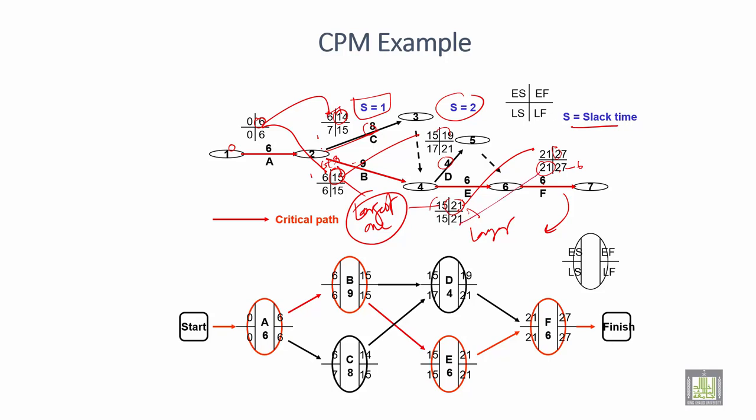This 21 you put here. Then 21 minus 6 is 15. Then 21 minus 4 is 17. Now choose the minimum. Minimum is 15, so take this 15 because 17 is more. Then 15 minus 9 is 6. Then 15 minus 8 is 7. Choose the minimum, which is 6. So 6 minus 6 is 0. Like that you have to frame the path. Going forward is plus, coming backward is minus.